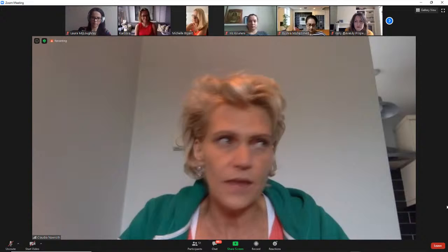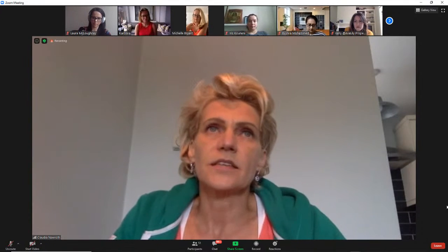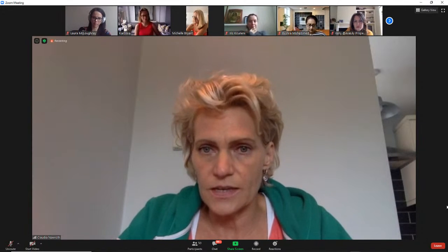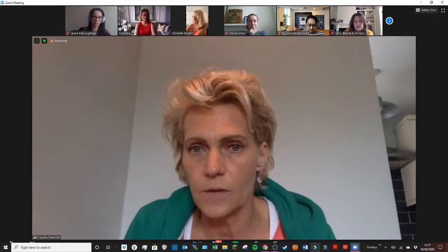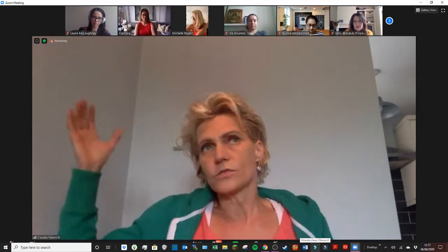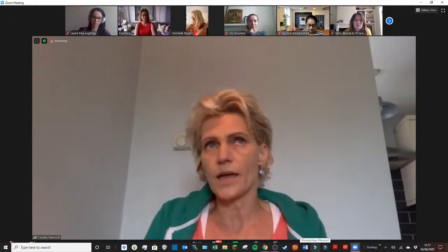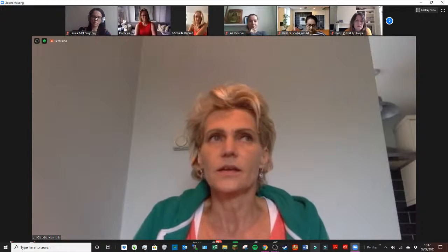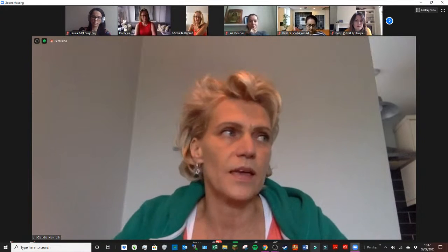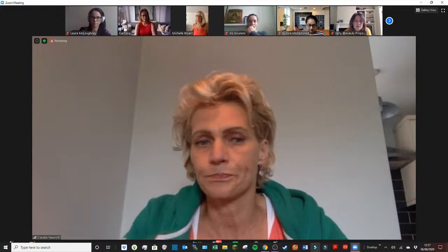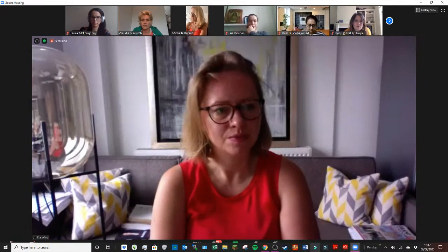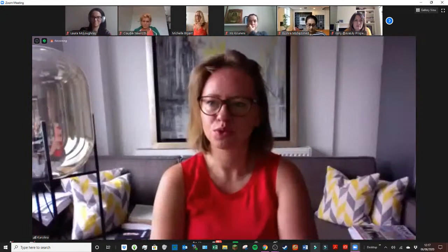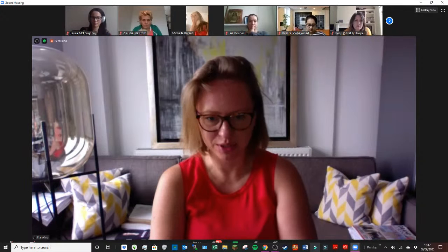I do an estimate and I think, oh, I'm spending 6 hours, 10 hours, 15 hours per week on that project. And then I apply my own hourly rate. If it goes beyond that, the client will still only pay that fee. Then I lose money, but I try to make it as transparent as possible. And you can't really write down every 10 minutes that you work on a project. It's impossible.